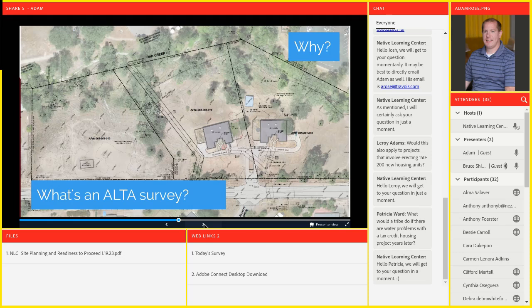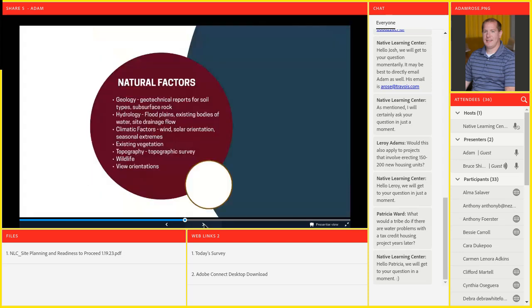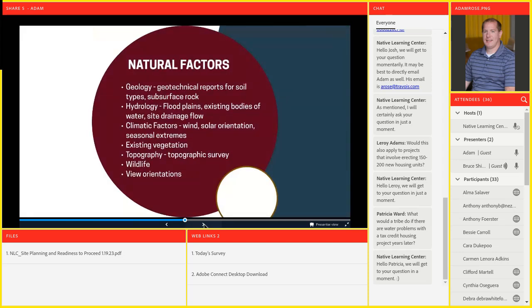And when we were doing our geotechnical work, when they were doing the borings to determine what the underlying soils look like, I told them there used to be a school here. I don't know if the old foundations had been removed or just filled in. If you're going to be building structures, you want to make sure you know what's below the ground, because you don't want your new building to settle crooked.